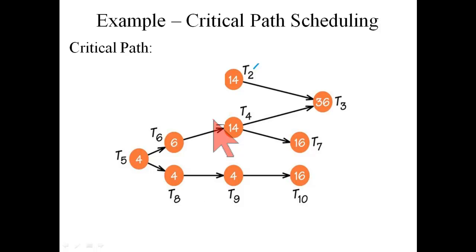And so here is the result once this task 1 is gone, and now you just repeat the process and start anew and say, okay, what is the critical path here? And I think 36 again is large, so feeding back through here, if I start at T5 and go to T6, then 4, then 3, that's going to be my new critical path. The task at the head of that critical path is 5. It's back here. And so that and any associated edges are going to get deleted, and I'll continue the process.